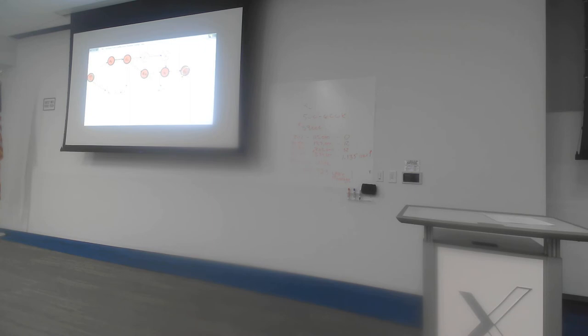And if you think about it, that would make sense. If I was to crash J by a day, that would mean that both of those critical paths on my table of critical paths would reduce by one, because J is on both of those paths. In actuality, J is on every path. So by reducing J by one day, I would be bringing back the overall project duration by one day, and I would get my bonus. So that's option number one.